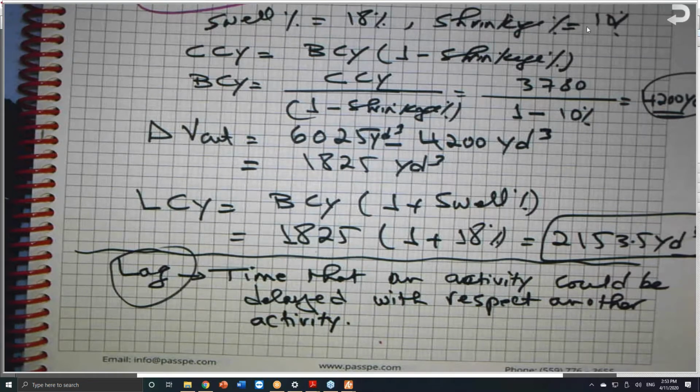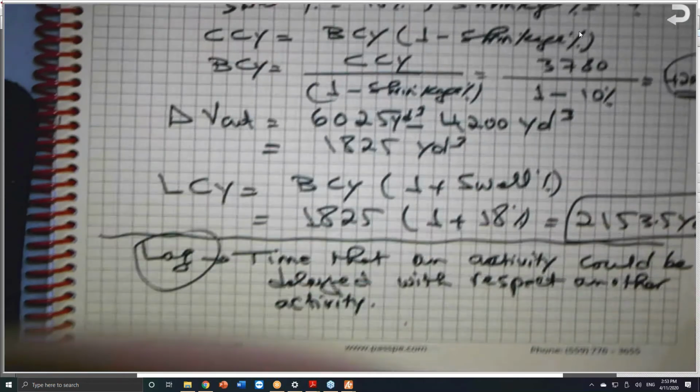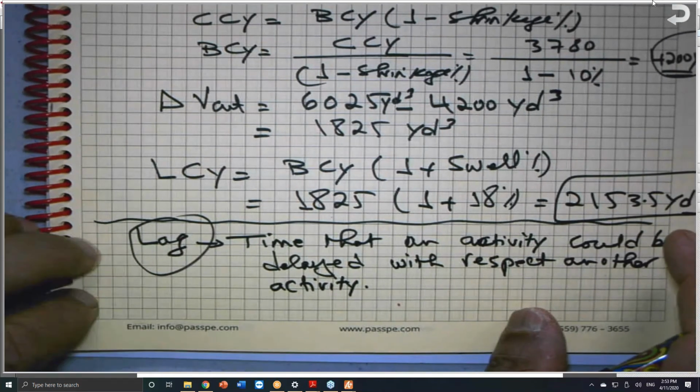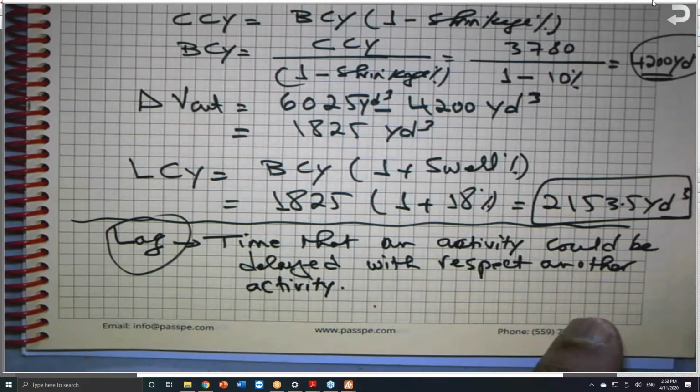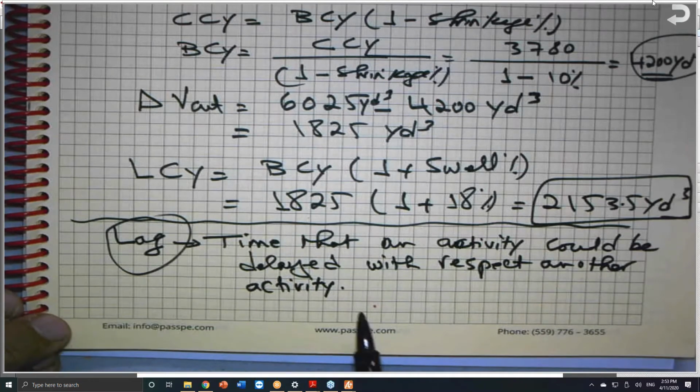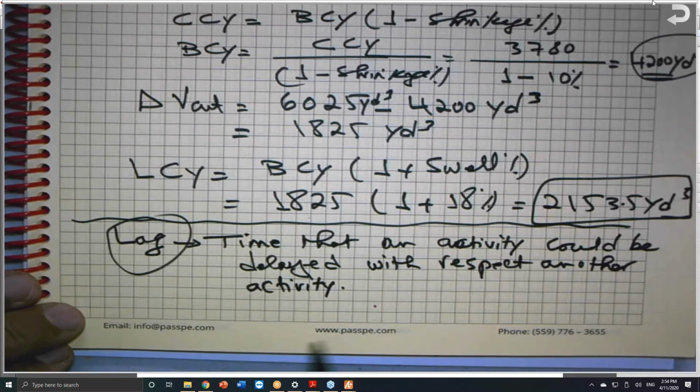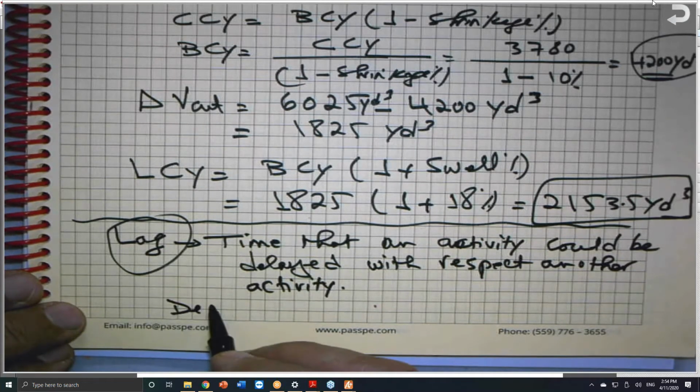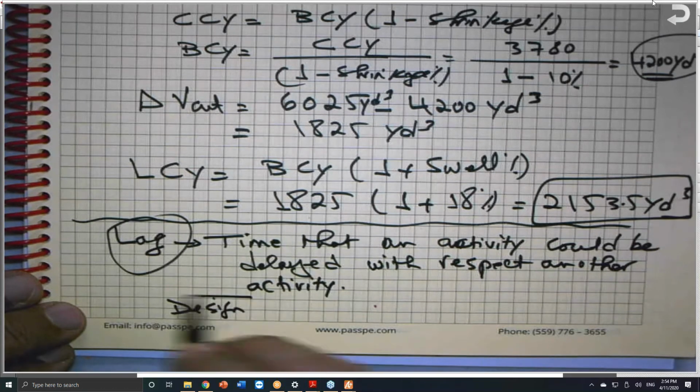Our friend, for example, mentioned an example. We can wait for the environmental report. Yes, you could have the design, and the design is waiting until we get the environmental document. You could finish the design, but you cannot go to construction. The design is done completely.